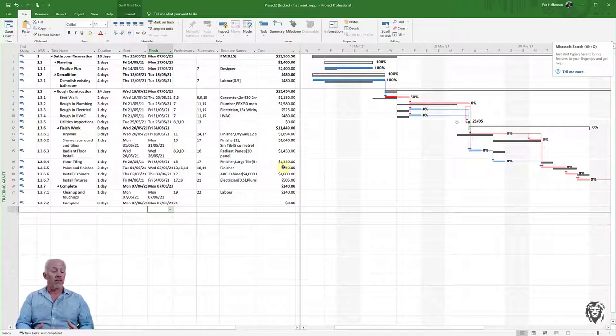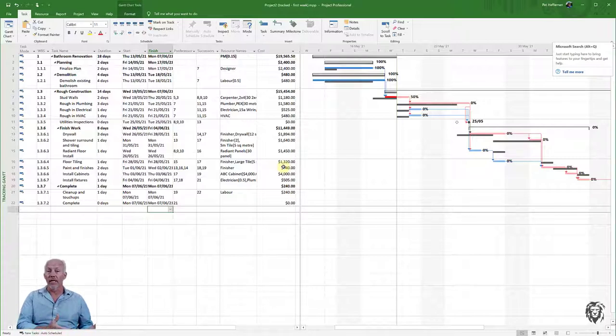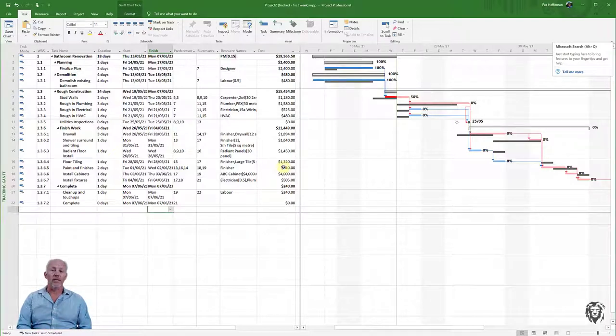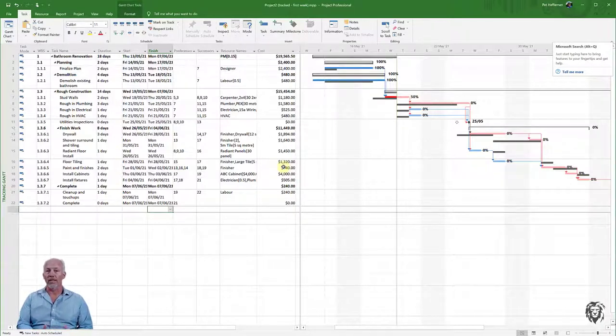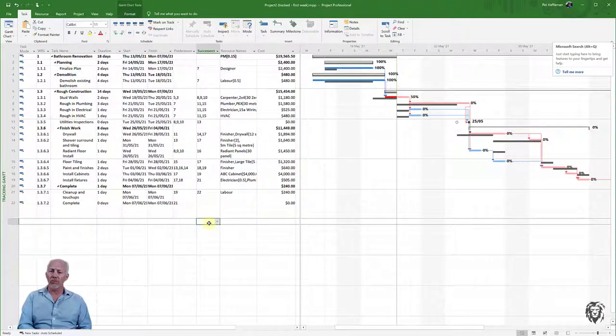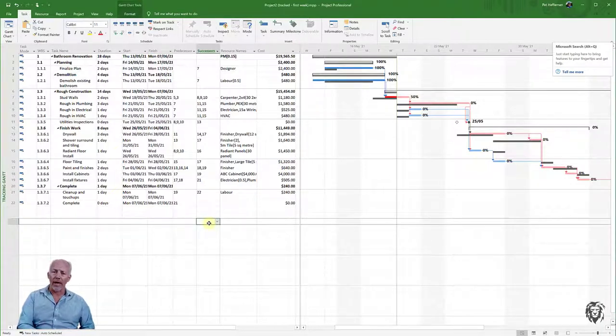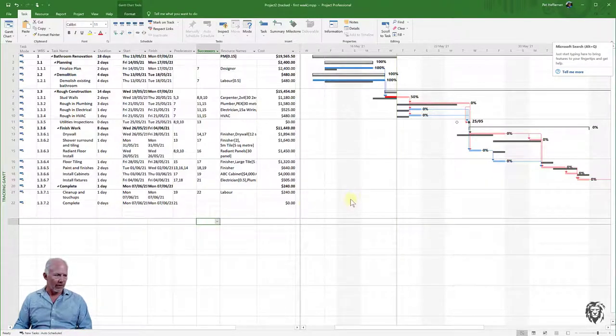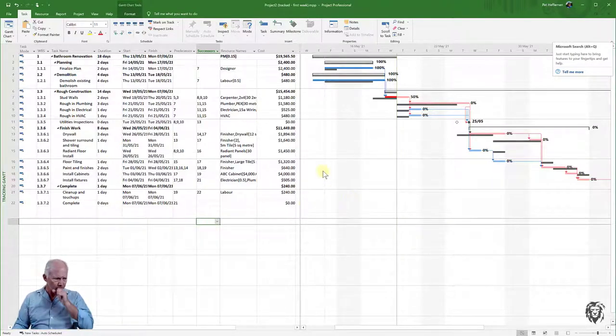Now this assumes there's a linear relationship between resources applied and output. Sometimes it's more, sometimes less. You'll have to make that choice and adjust your resources or the work and duration accordingly. Don't assume it's always linear. You have to make a deliberate choice and ensure those values are correct.